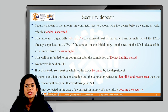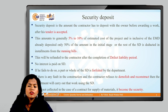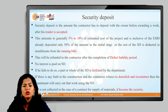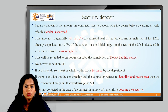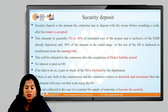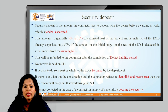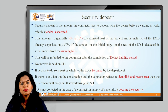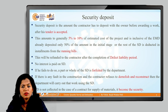The next terminology is security deposit. This amount provides security for faulty work done by a contractor. If defects are found after project completion, the repair and maintenance cost is borne from the amount withheld from the contractor's bill. The security deposit is collected as 5 to 10 percent of the total bill.